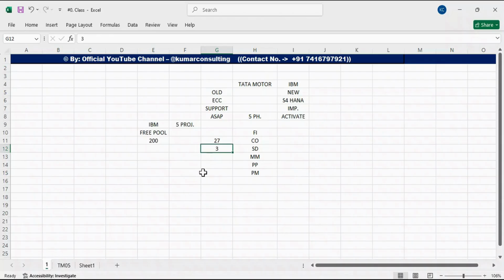Second thing is third party payroll. Let's suppose the project manager thought, okay, there are no upcoming projects in the pipeline. If I hire these three resources and there is no upcoming project after this implementation, what will happen? If there is no additional project, then why hire the candidates again on permanent payroll? So in that case, they can go for third party payroll.